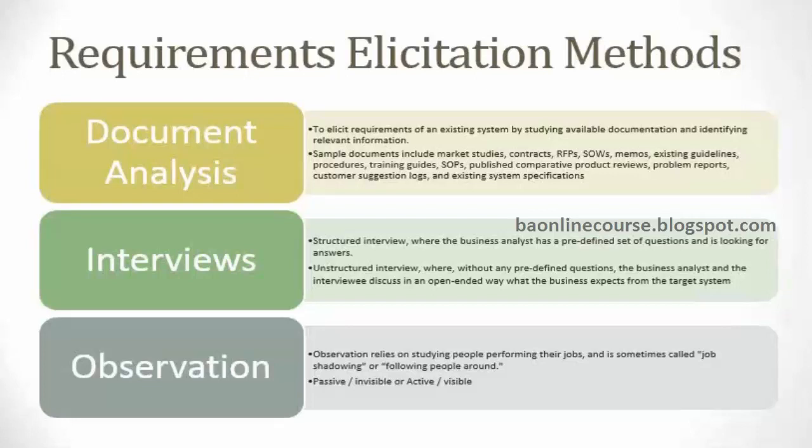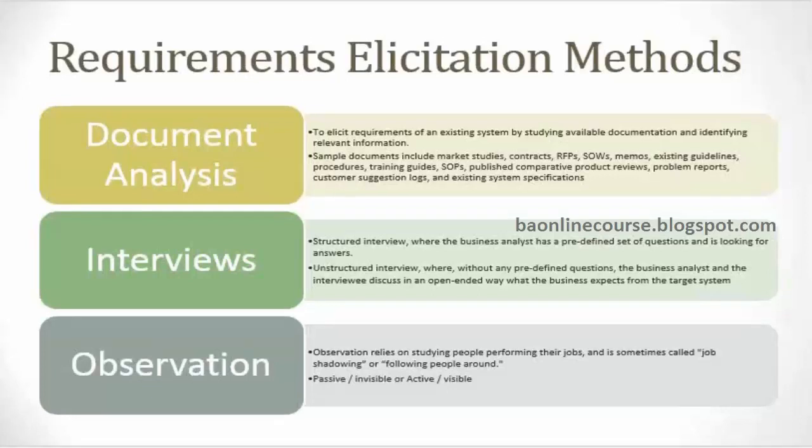Okay. So broadly you'll take approval. You need to figure out, based on the project, which team is authorized to take that decision. You'll send it to them. After that, what? Then I think you go on with the development based on the decision. You would either go for the development of it, or if the senior manager says no, you don't have to proceed further. You leave it there. The last thing I think we do is integrate learning and results, and conduct a closeout and evaluation. I think you do that as well, right?